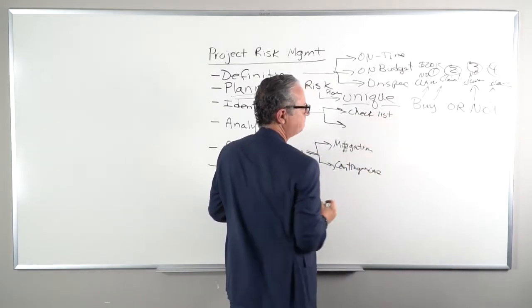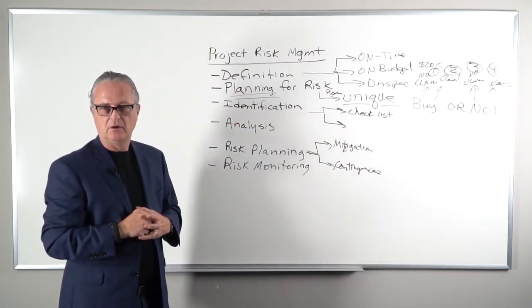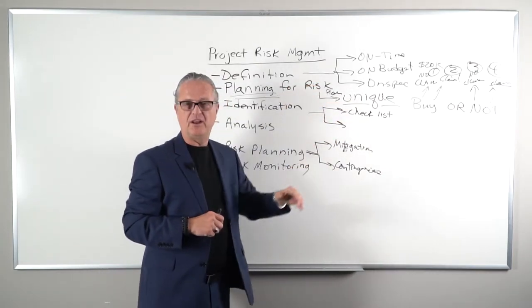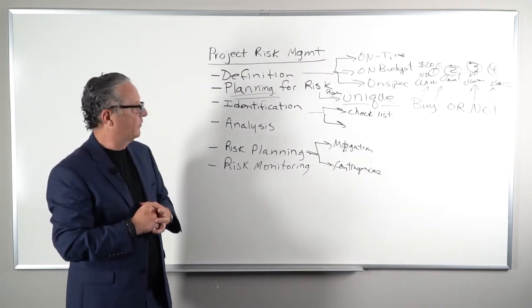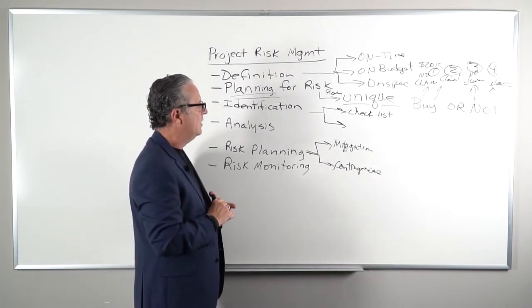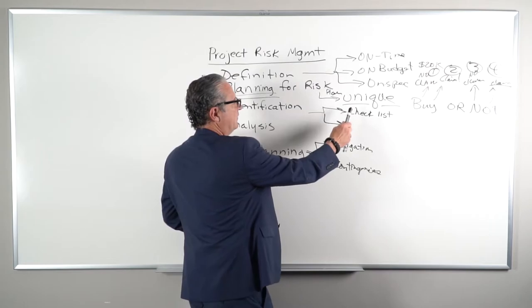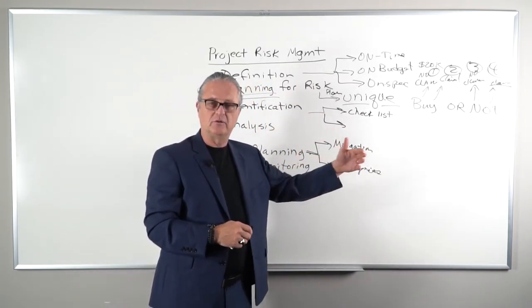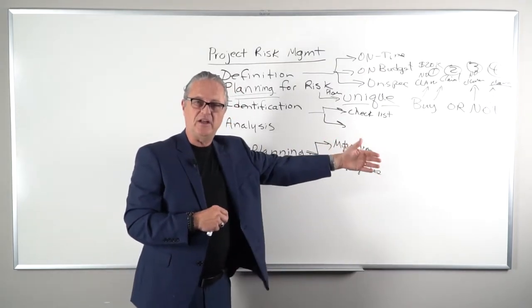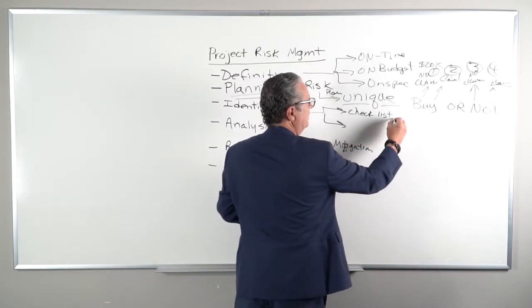a checklist, okay? So if we were thinking about product development of a new pharmaceutical, could we have previous experience in looking at the profiles of the risk that happened in the drug development process? Or for information technology, what kinds of things go wrong in those kinds of projects, right? So if you went out on a search engine and said, show me samples of risk identification checklists for pharmaceutical development, for IT development, for architectural and design, for aerospace and aircraft, okay? We can find all these things based on experience, not only across industries,